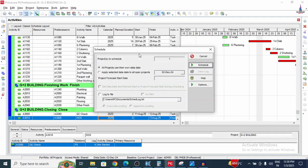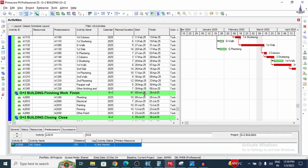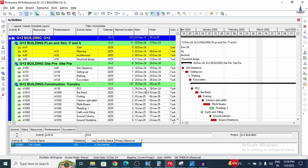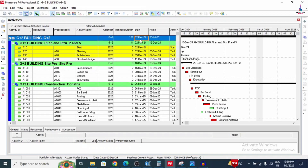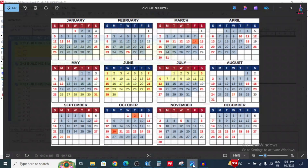Now go to the Schedule option and click 'Apply to All Selected', then click Schedule. This will update all calendars and recalculate the dates. We can see that with the project starting on 2nd December 2024, it will now end by 30th July. The planned working days remain 191, but with our holidays factored in, the total calendar duration is approximately eight months.